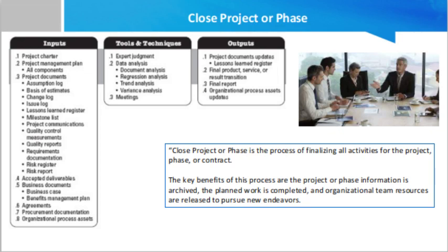Assumptions are what you believe to be true for the duration of the project, and constraints are what you believe to be limiting your ability to manage the project. I guess now is the time to find out if you were right. My advice is to maintain a record of the source for your belief in these assumptions and constraints, because if the project has gone badly, the blame game starts. The blame game will start with the assumptions and constraints, then the risk register, and move on to the basis of estimates.